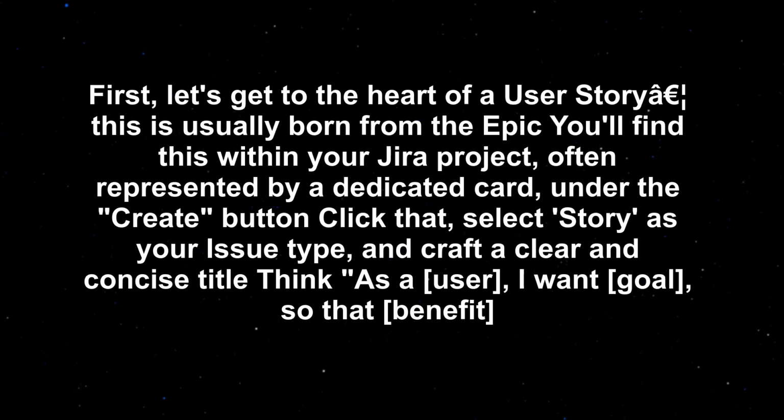Under the Create button, click that, select Story as your issue type, and craft a clear and concise title. Think as a user: I want goal, so that benefit.